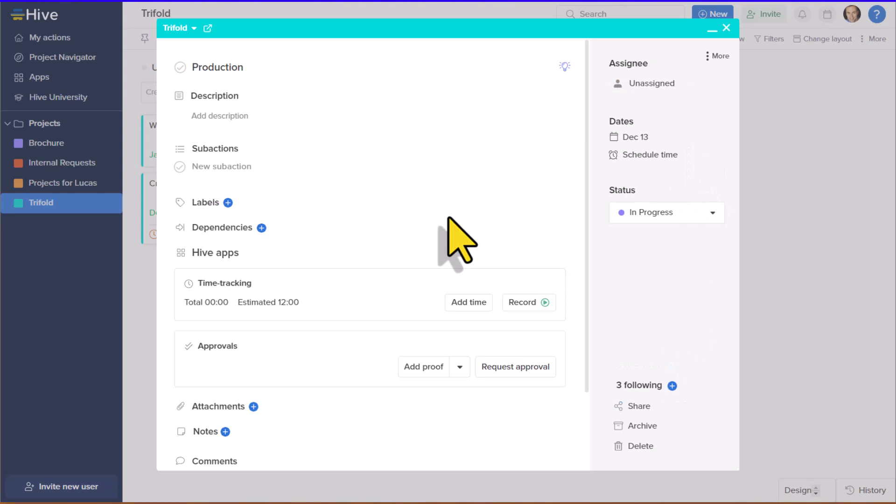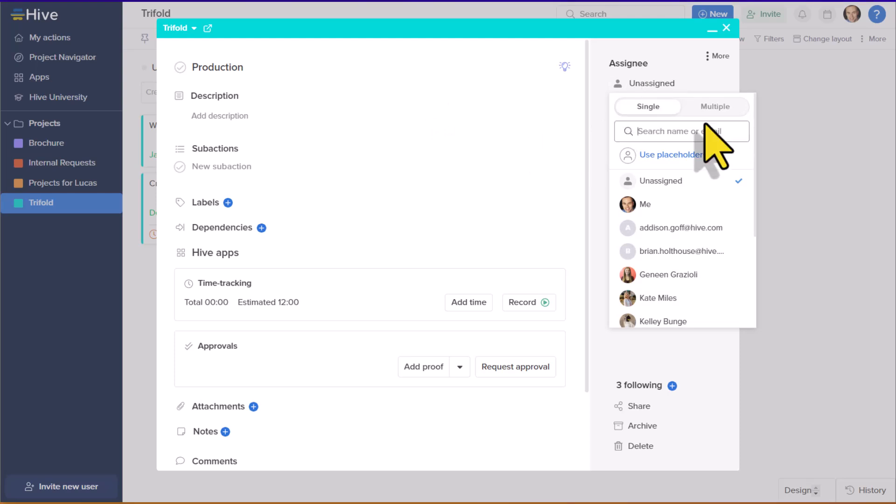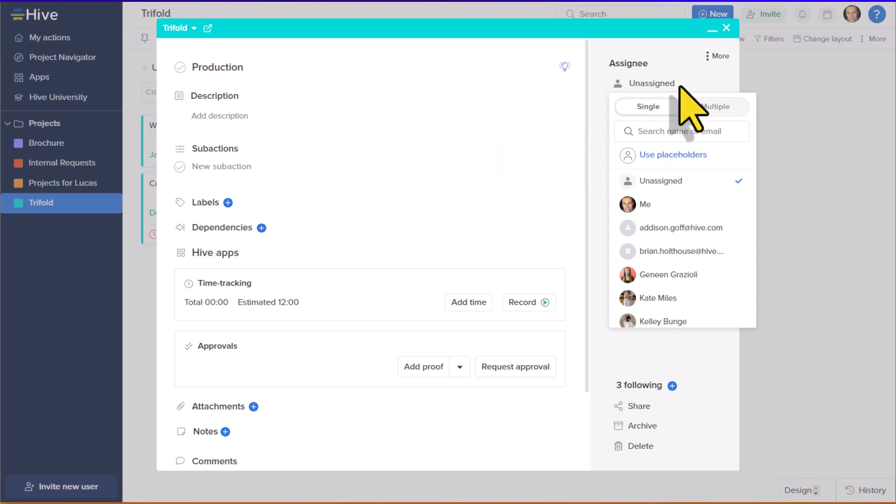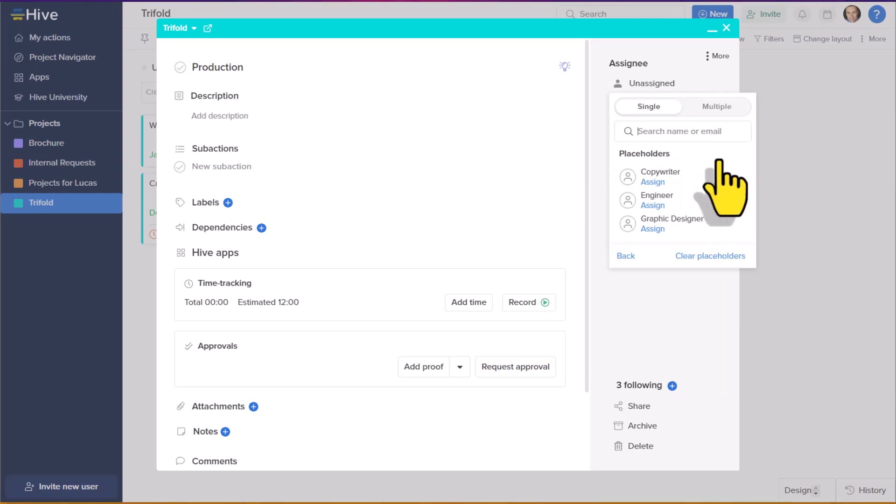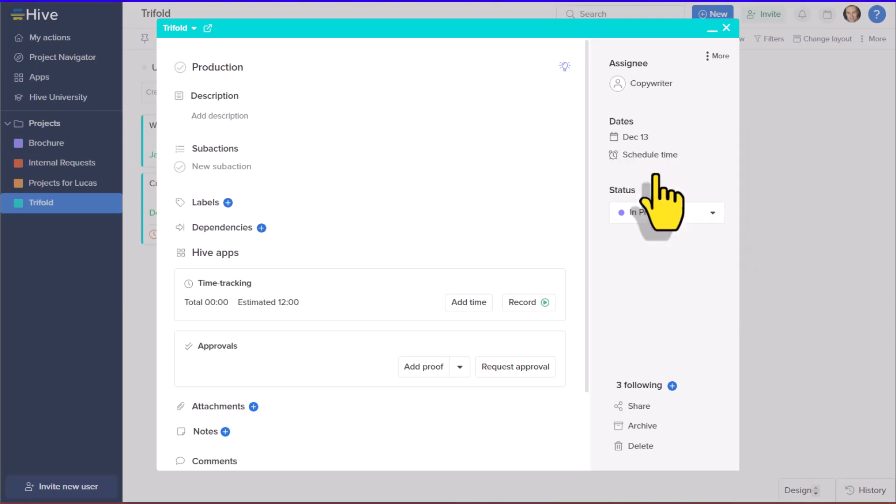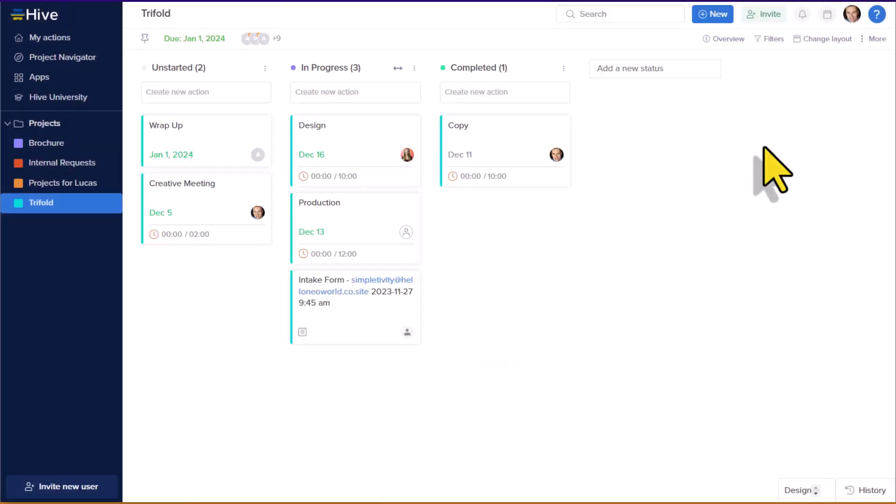In addition, Hive has another feature that I absolutely love. Sometimes when creating a project or a task, you don't know exactly which individual will accomplish the work, but you do know what type of skill set or maybe what type of role should be performing this task. So here in this example, I've yet to assign anyone and I'm not exactly sure if it's going to be Kate or Kelly who does this. But what I do know is I can use a placeholder. Since both of them are copywriters, I'm going to assign it as a copywriter role.